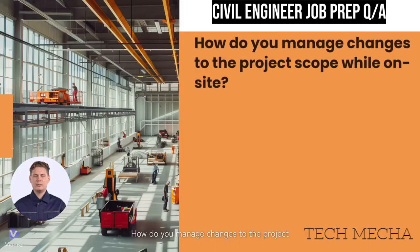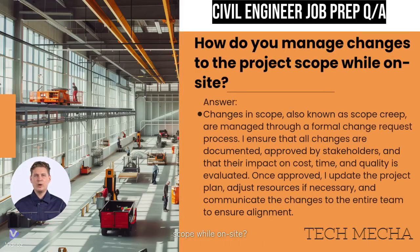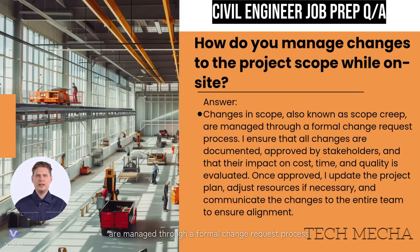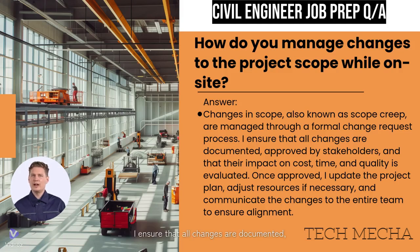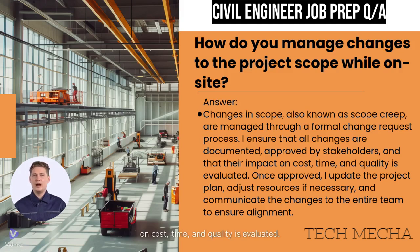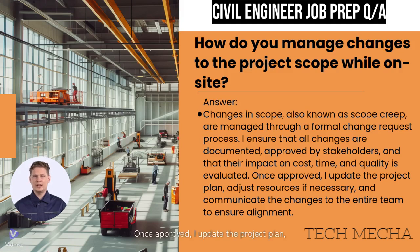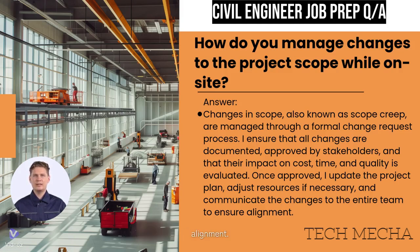How do you manage changes to the project scope while on-site? Changes in scope, also known as scope creep, are managed through a formal change request process. I ensure that all changes are documented, approved by stakeholders, and that their impact on cost, time, and quality is evaluated. Once approved, I update the project plan, adjust resources if necessary, and communicate the changes to the entire team to ensure alignment.